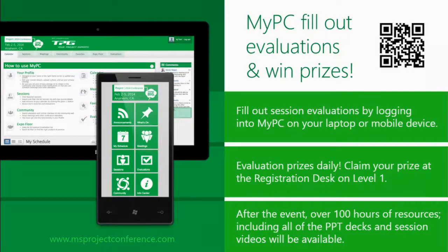So in 2030, the PM doesn't have to do the publish anymore? In 2013, no, the PM still needs to perform that operation of hitting publish. There's a scenario there that we want to fulfill, which is that the user has that playground in the draft working store, and they're iterating on that plan, and they're not ready to share it with the world. Like, I build out my first project plan, I want to get all the tasks figured out. I don't want people to start working on those tasks.